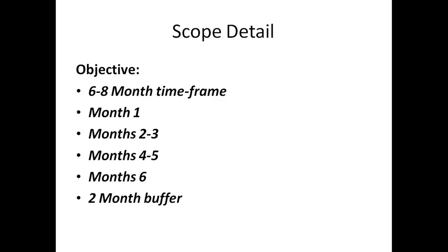Month 1 will be allocated for acquiring company data and information flow results to place into the database reservoir for beta testing. Months 2 to 3 will be allocated for beta testing small pools of current employees to get feedback of the project's progress. Month 4 and 5 will be allocated for tailoring and revising the current documentation of the project's objectives, constraints, and approach based on the previous months of testing. Month 6 will be allocated for the final revisions, timeline documentations on how to roll out the migration, and the actual deployment of the project deliverables.